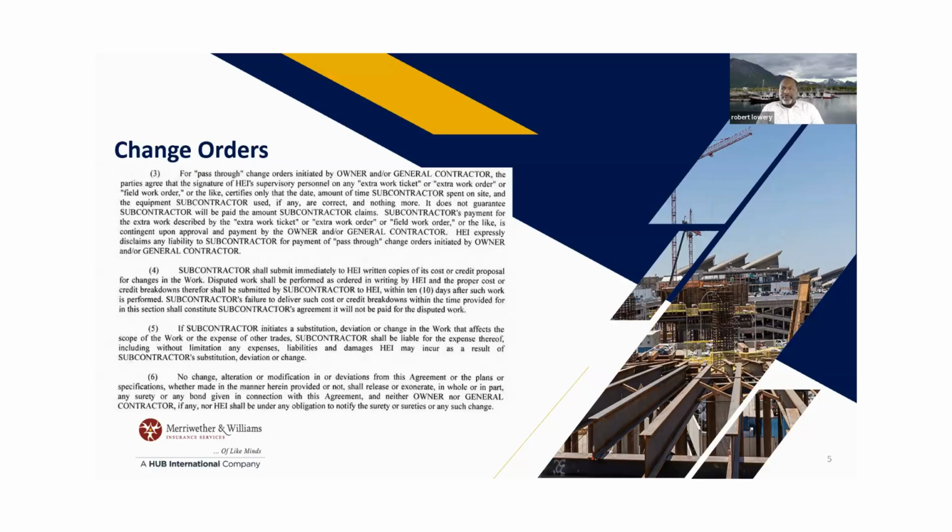Also, one thing that falls within these change orders is deductive change orders, back charges. So if you're out there working and you get a warning saying, hey, you're not doing this correctly, or you have damaged someone else's work, then they're going to put it in writing and say, hey, you've got X amount of days to fix this. If not, they're going to back charge you. So with back charges, they have to give you a notice in writing in advance, so you're aware of these back charges.